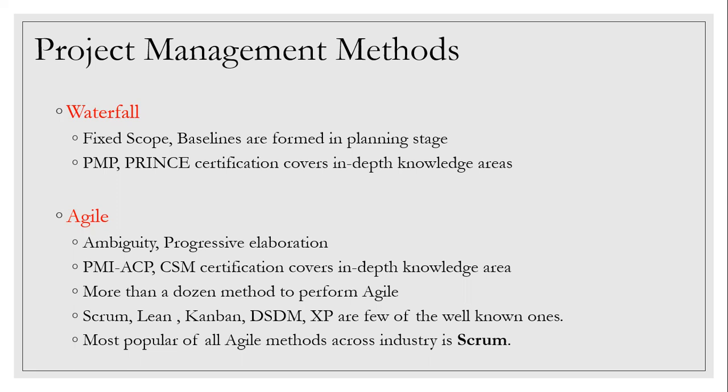The keyword for agile is progressive elaboration, or we call it rolling wave planning. It means that we are not planning everything in one shot. We are planning as we go through the journey. Okay. And that will never stop. If the product is a hit, it's being liked by the users, it's generating revenue, then at no point will the team say that now we have done all the features of the product and we have launched it, now we are plugging out. They will not plug out, they will always be there. If the product is messy or is not liked by the end users, then they are going to shut down that project.